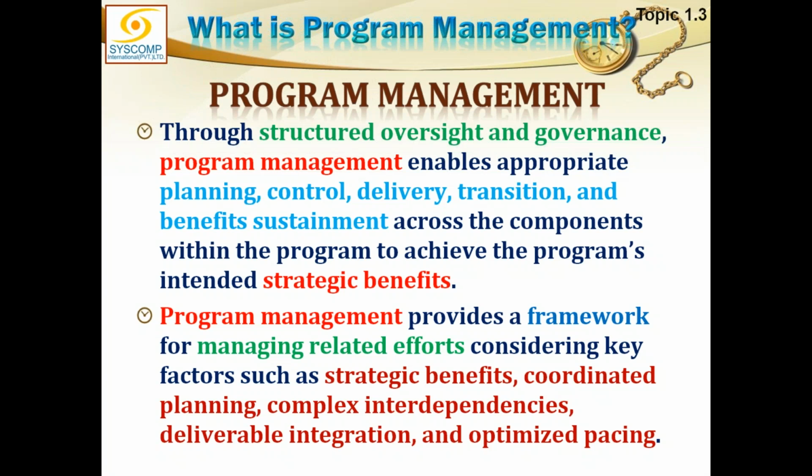The future benefits which are going to come out of it, we will close the program, it is not going to be there anymore. The customer would be responsible for future sustainment of these benefits, so we will provide them a benefit sustainment plan. Although in benefit transition we also provided them some kind of training on how to make use of these benefits, how these benefits are going to sustain, we have to train them and we have to provide them a complete plan for that.